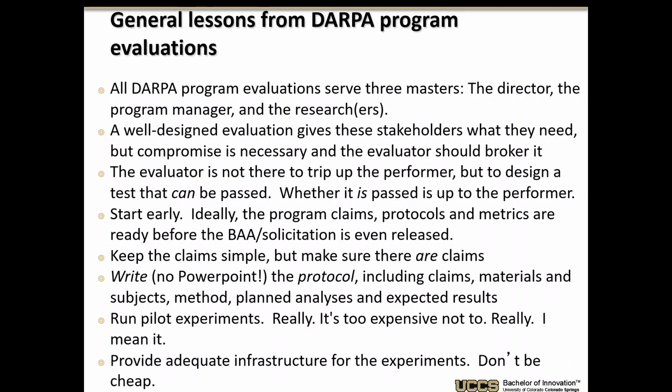It's a really good idea to run what are called pilot experiments. A number of DARPA programs actually start with what they call seedlings. Seedlings are very small efforts, often to collect data and prove out some ideas before they launch the big BAA, but also to have some data to go along with it. It's important from a DARPA point of view. People say, why are we spending money doing that? We're just going to do a BAA next year. It's really expensive not to do this. If you don't have preliminary data and you don't have the right scoping, you can spend millions of dollars and not achieve your objectives. So you want to get that out there early.